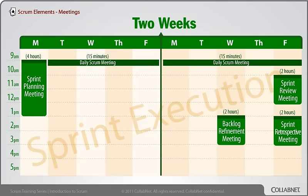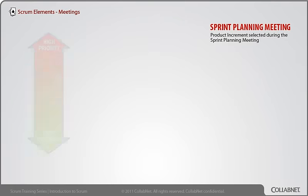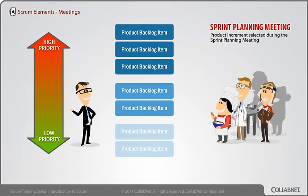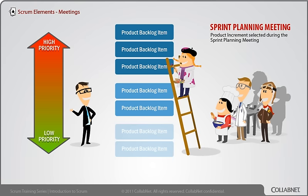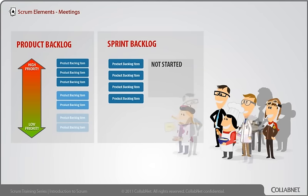I personally like to end the sprint on a Friday so we don't work over the weekend. At the Sprint Planning Meeting, the team and Product Owner negotiate which items will be committed to the sprint. The team pulls the top priority items from the Product Backlog, commits them to the Sprint Backlog, breaks them into smaller tasks, and decides whether it's the right amount of work and whether they're clear about what they're going to do.